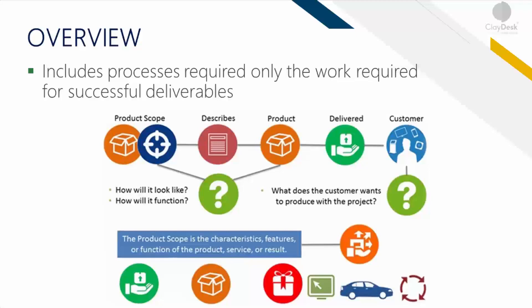This is fairly common: if you're working on a project daily and having client calls daily, your client may ask you things that are sort of relevant to the project but are actually new development. As a project manager, you need to have a keen eye for any new processes, because that would entail a change order and not necessarily something part of the existing scope. As you gain more experience in the PM field, you will get more skilled at this.